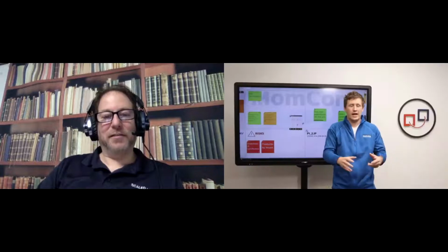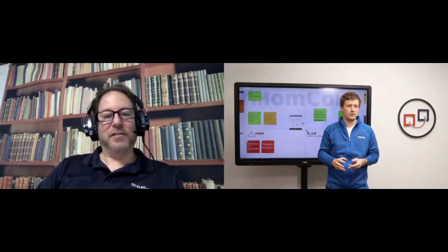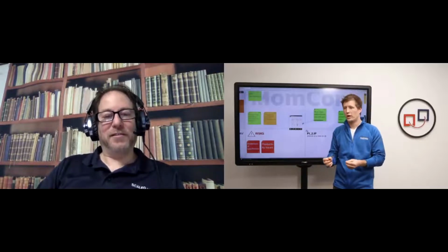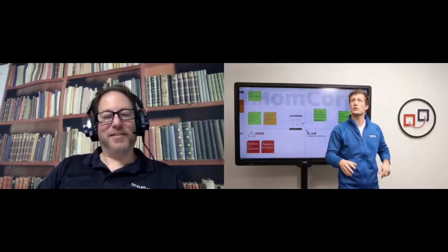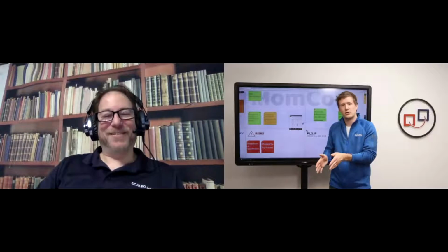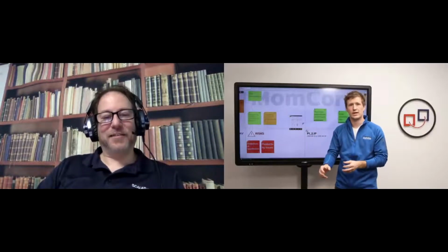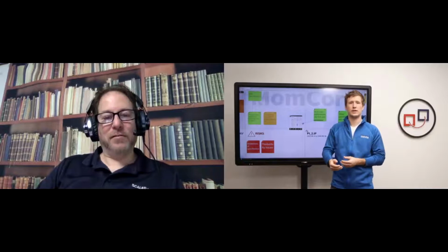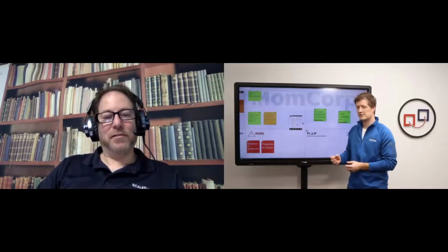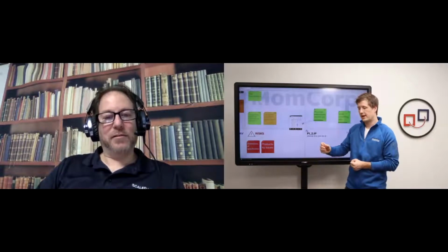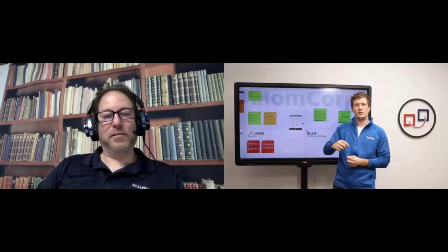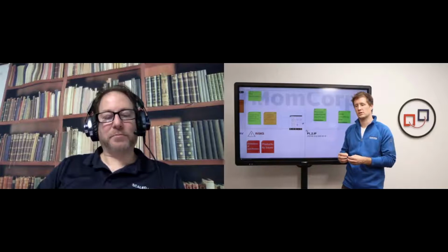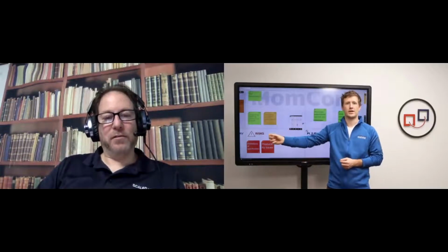What I often tell people when they ask how do we make sure that teams don't get interrupted in a focused feature breakdown, and you don't see that in a remote PI planning. In co-located, you instinctively know it's a good time to interrupt that team because everyone is walking around, looking around and not doing anything. Or if they are really focused on breaking down a feature, maybe with product management discussing with them, you see it's probably not the right time to interrupt. So how do we shift those trigger points? What we need to do in a remote PI planning is shift the trigger points so that the receiving team or person, the person who needs the information, triggers the person providing the information, and not the other way around.